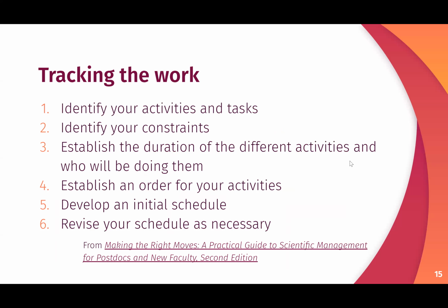And then you want to make sure that you are tracking the work that you're doing. I'm horrible at this, and I really struggle with it. So if you feel like you're horrible at this, I completely understand you. But we have identified your activities and tasks, or the things that need to be done. We have identified what kind of constraints, what kind of problems we may encounter when we're trying to do it. You want to establish how long each activity will take, and who will be doing it.